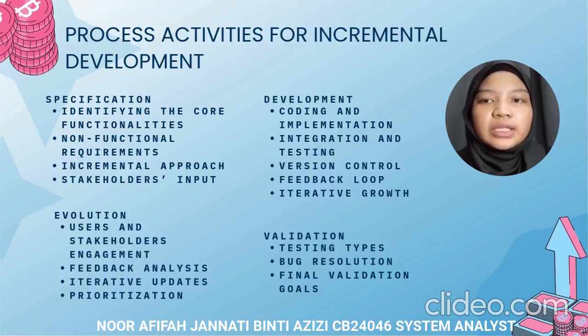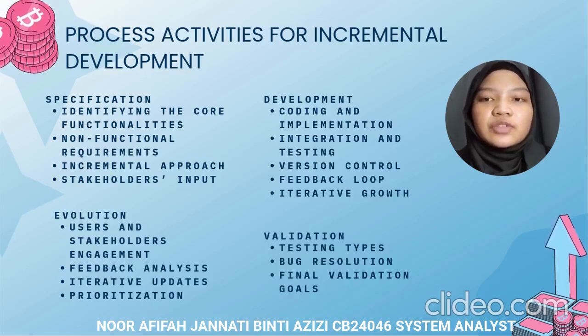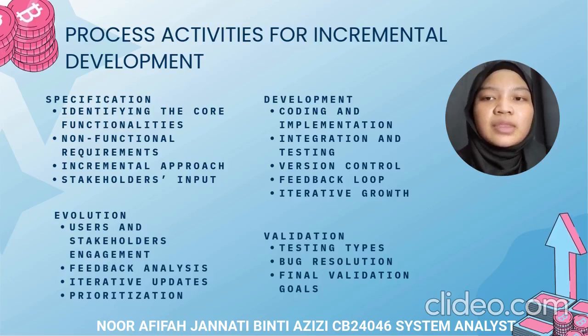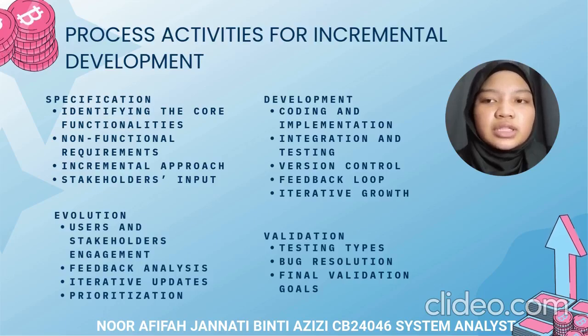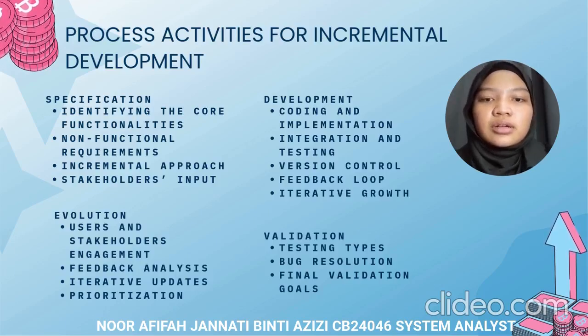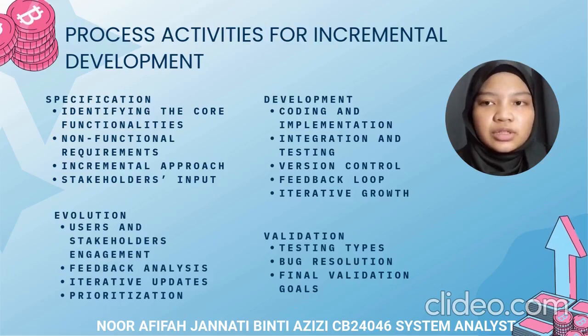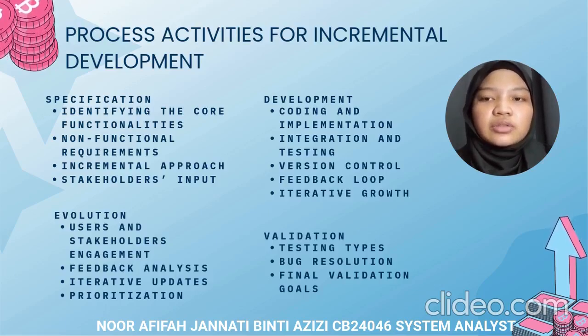Second, development. This begins with selecting a small prioritized set of requirements to focus on, such as developing the user registration system or the product listing feature. Developers write code for these features in small manageable increments, making sure each part is fully functional and can be tested independently. Throughout this phase, the team utilizes version control tools to monitor changes and facilitate collaboration among team members. Regular feedback from testers and stakeholders during the development phase helps to identify any issues early on, ensuring that the website evolves in a manner that meets user needs and aligns with project goals.